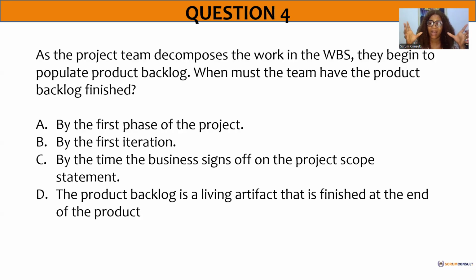But don't forget that agility is the ability to balance flexibility and stability. So we still have a way of balancing it out. We make our sprint backlogs rigid, but the product backlog we make open and we refine it all the time. That's what you see in things like product refinement and reprioritization. So we refine it, we evolve it. We keep looking at the things that are applicable and the ones that are not. The product owner alone has the single power to take out some things and bring in some things and refine it to meet the need of the customer, because the product owner is also representing the stakeholder, the customer.